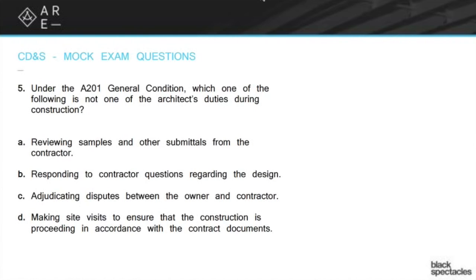Litigation is an actual court case — someone going into the civil justice system with actual judges and potentially juries depending on the case type and state. The backlog can take months, years, or even decades and will cost everybody, especially taxpayers, a lot of money and time. The whole point of IDM, mediation, and arbitration is to try to keep disputes out of that situation.